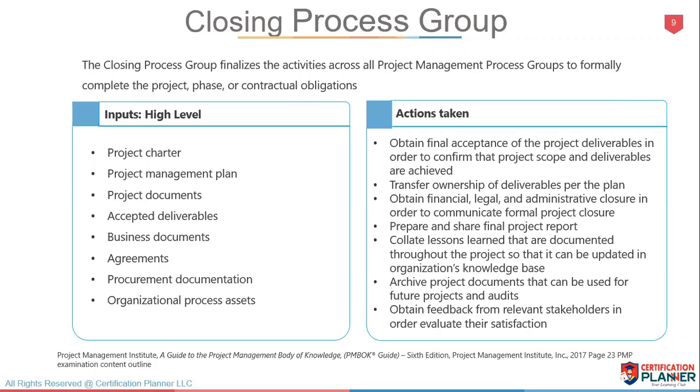So, and again, you'll see here, project charter, project documents, management plan, all this stuff looks familiar, right? As we mentioned before, these are living documents, and you have to close this stuff out. So, when we talk about closing, we're talking about getting final acceptance, maybe transferring ownership, closing legal or financial accounts or responsibility, recording any data that's learned from the project, archiving things.